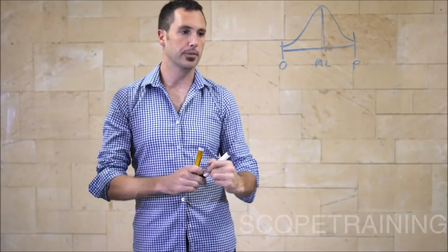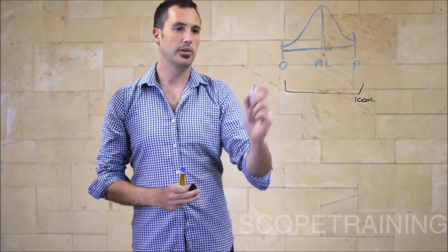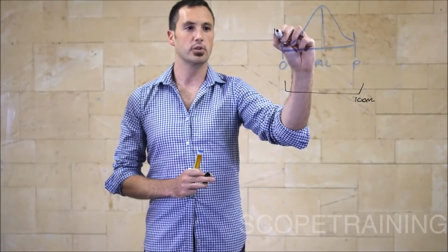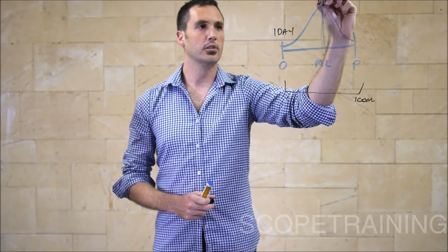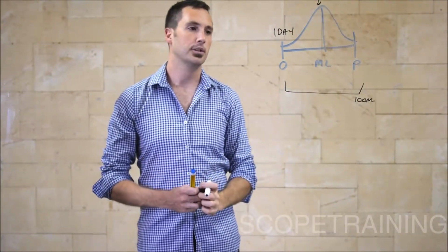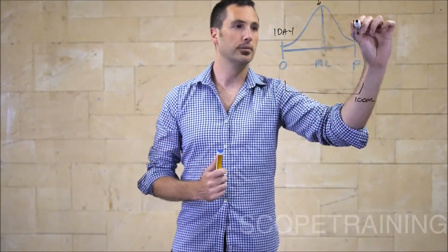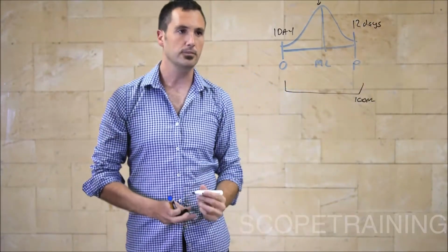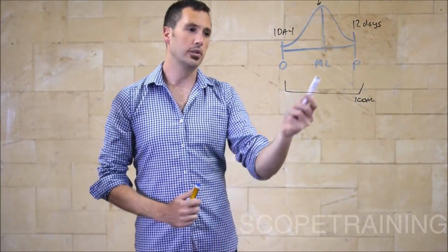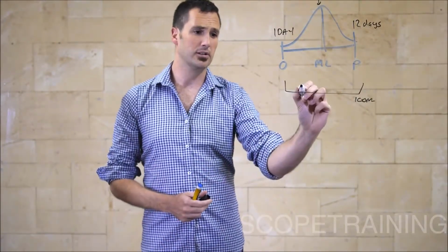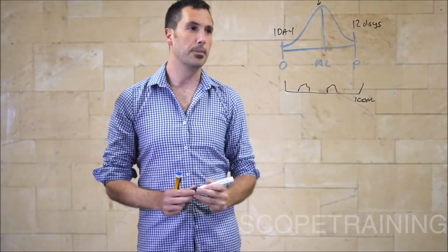Quick example, let's say we're digging a trench. So we've got a 100-metre trench to dig, and best case, if everything goes our way, we can get this trench done in 1 day. However, history has taught us that 3 days is probably our most likely. Worst case scenario, well, I could go crazy with this, but let's say 12 days. And that's assuming that things don't go our way. We have a really bad experience. In this example, it's probably a good one because as you're digging, you might hit uncertainties, rocks, and so on that need to be blasted. So it's probably a good example there.